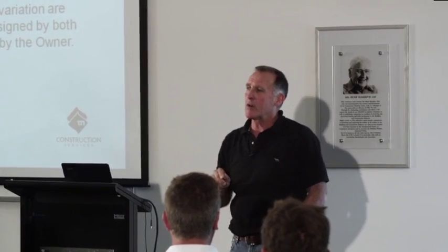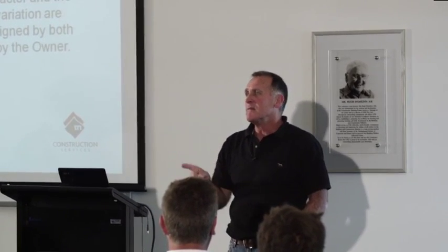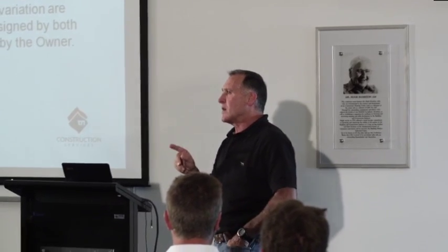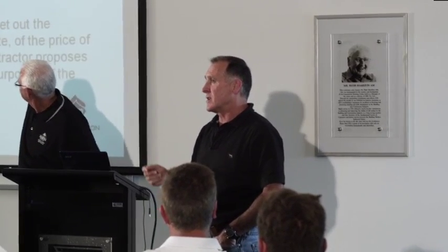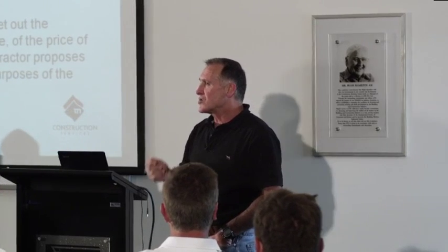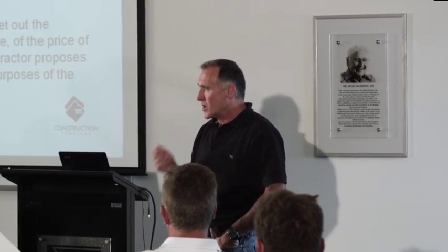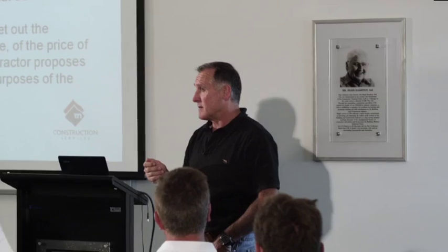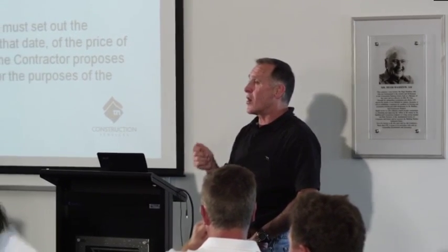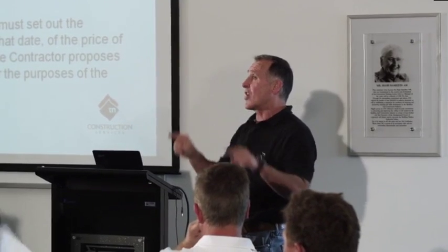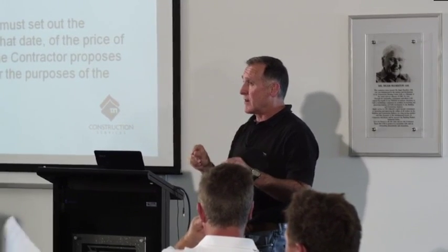It could come back onto you and say, well, if you were providing adequate supervision, you would have been on top of this and not let this happen, or used the appropriate documentation prior to it being installed. There's probably a strong possibility that you would have to wear that, simply because you didn't meet all of the criteria that you signed the contract to do under the scope of work.